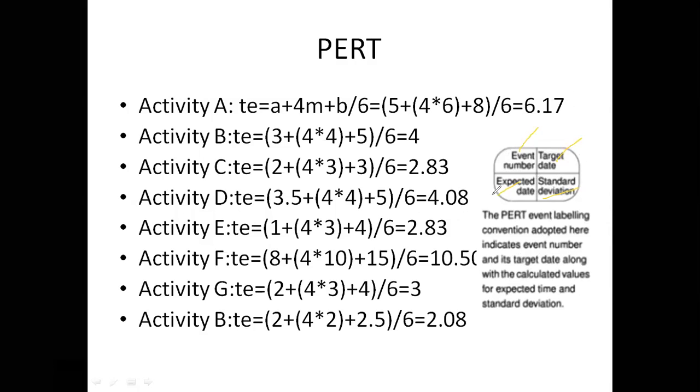The advantage of this approach is that it places emphasis on the uncertainty of the real world. Rather than saying the completion date for the project is a fixed date, we say we expect to complete the project by a date. We have to calculate all these values in the next slides. So let us move to standard deviation. See here, standard deviation.